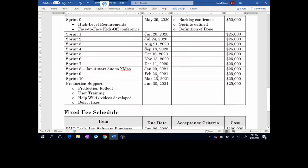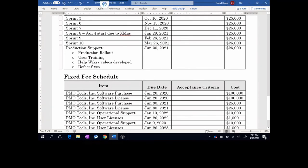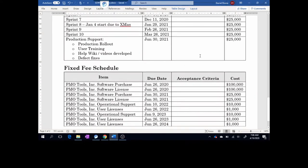It's basically the same concept as the Waterfall. Down here, you want to make sure you have production support once the system is developed. You have a production rollout, user training, maybe a wiki or help videos are developed, and you may have a process for defect fixes based on the development. Work all of this out with the vendor and make sure the acceptance criteria is defined in this section. That covers the schedule portion of the delivery schedule.